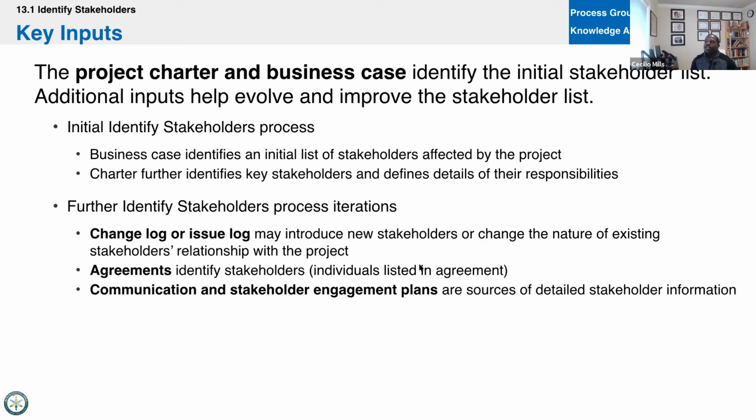What I learned, more from doing agile projects, is that transparency is king. As new stakeholders come on, we say, hey, we've got new stakeholders, and we just promote that. We let people know we've got these folks coming on. We've collected their requirements and added them into the list, right? Now that we've got the list, if we were to do all of this, this is what the scope looks like. Are you guys sure you still want to do that? You put it back on the group, and then almost it seemed like, hey, you guys just can't come in and start changing our thing, and then you don't have to do it. The group does it for you. Or the group is like, hey, no, wait, this is a great idea. Let's increase this. And then now you have a longer engagement. So it's sort of a win-win. That's my take, take that as you may.